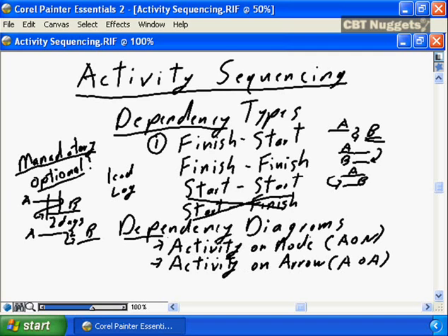One comment on dependency diagrams and creating dependency diagrams. As an active project manager delivering projects, using a tool like Microsoft Project, which we'll be examining in part of this series, you do not need to create dependency diagrams. Your software will create the dependency diagrams for you. You simply define the dependency types to your project software, and the project software itself will create the dependency diagrams.